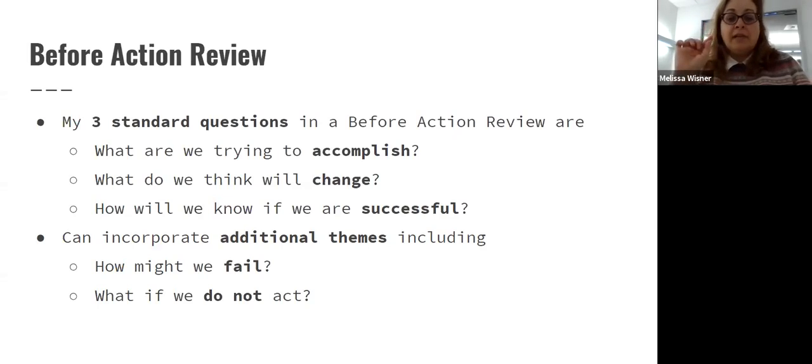And so one thing I definitely am mindful to do is, when you look at the list of feedback you've received about what are we trying to accomplish, and you go to the board with the information about how will we know if we are successful, those two sets of intake should line up in some way, because you could have a success measure, but if it's not reflected in something you're trying to accomplish, then you have a bit of a disconnect. And hopefully that makes sense. I'm happy to talk through that a bit more.